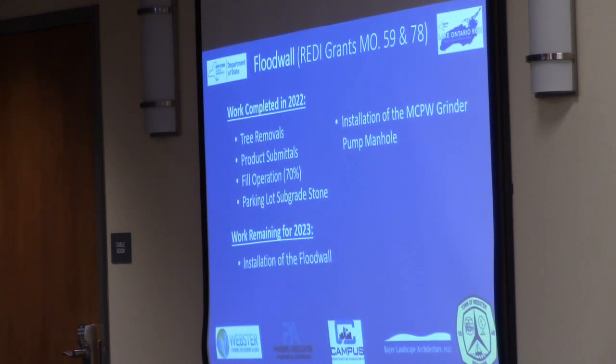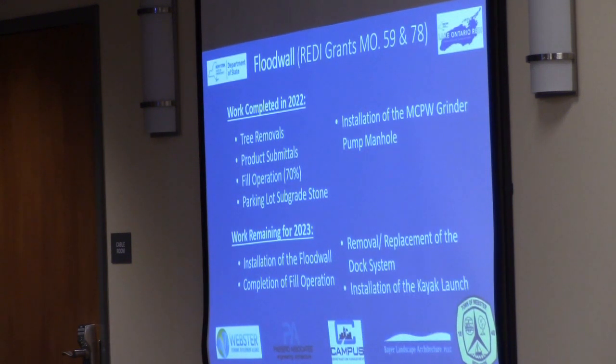Work remaining for 23 is going to be the actual shovel in the ground for installation of that flood wall. We're anticipating that in early spring. Completion of the fill operation, removal and replacement of that existing dock system. You see some photos of that. And then the installation of the kayak launch and some other park elements on that side.